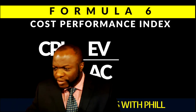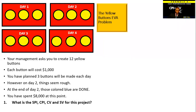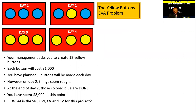So let's take a look at the CPI in the Yellow Buttons Problem. The problem says you're meant to manufacture three buttons a day for four days. Management asks you to create 11 yellow buttons, and each button will cost $1,000. You've planned three buttons will be made each day. However, on day two, things seem rough. At the end of day two, those colored blue are done, and you have spent $8,000 at this point.